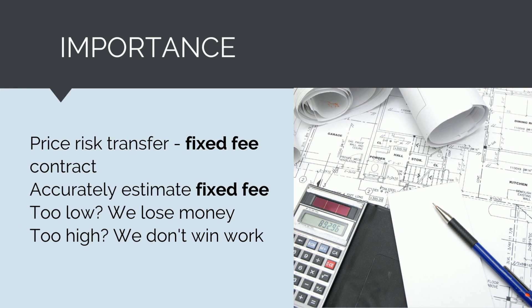Why is this important and why does it matter? Basically, estimating is important because construction contracts are usually fixed fee. This means the price risk is transferred from the client to the contractor, and the contractor is responsible for the end project cost.